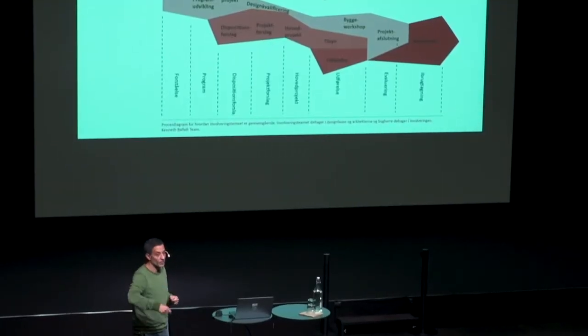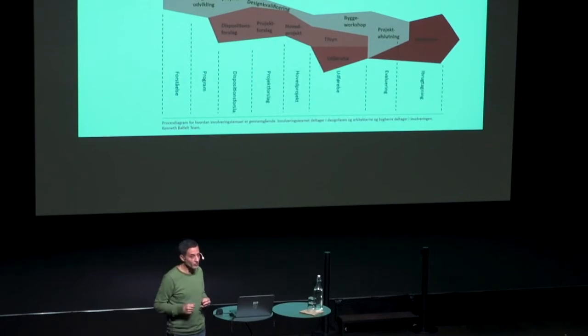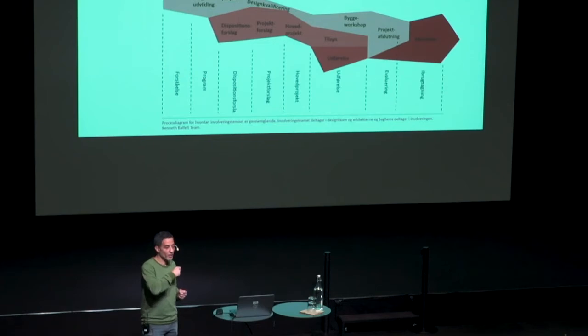So you can say that we were the involvement team, and there were the architect and the contractors. Normally those are consecutive teams, one after the other, that hand over. But I don't believe in these handovers because there's a lot of things that get lost. So I insisted that we were part of the whole process. So we, who had the users' input under our skin, also participated together with the architect. We also invited the architect to take part in some of the user involvement.